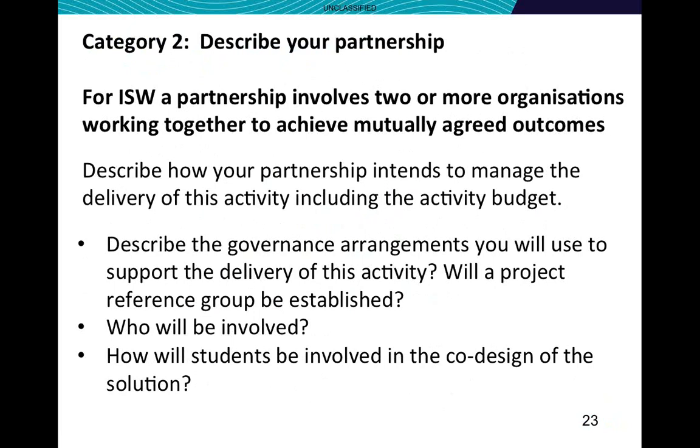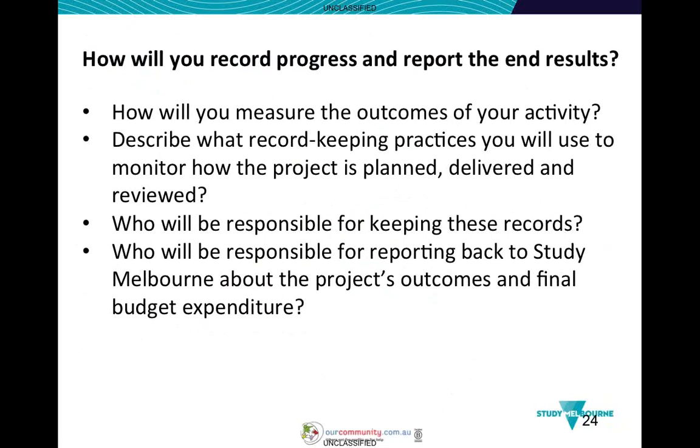The other thing that you'll be asked is how you record progress and report the end result. So how are you going to measure the outcome of the activity? Describe the record-keeping practices that you'll use to monitor how the project is planned, delivered and reviewed. Who's going to be responsible for keeping records, and who's going to be reporting back to Study Melbourne about the project's outcomes and final budget expenditure? So you will be asked to expand on that in the relevant question.